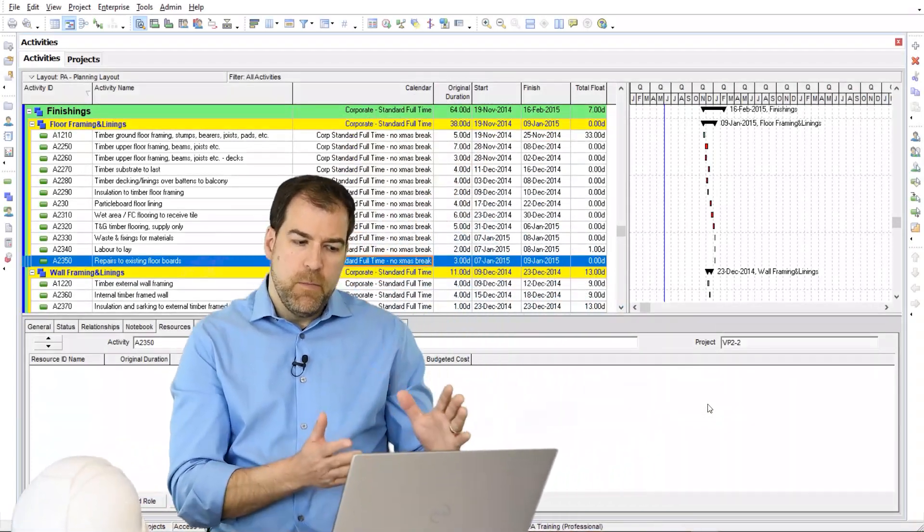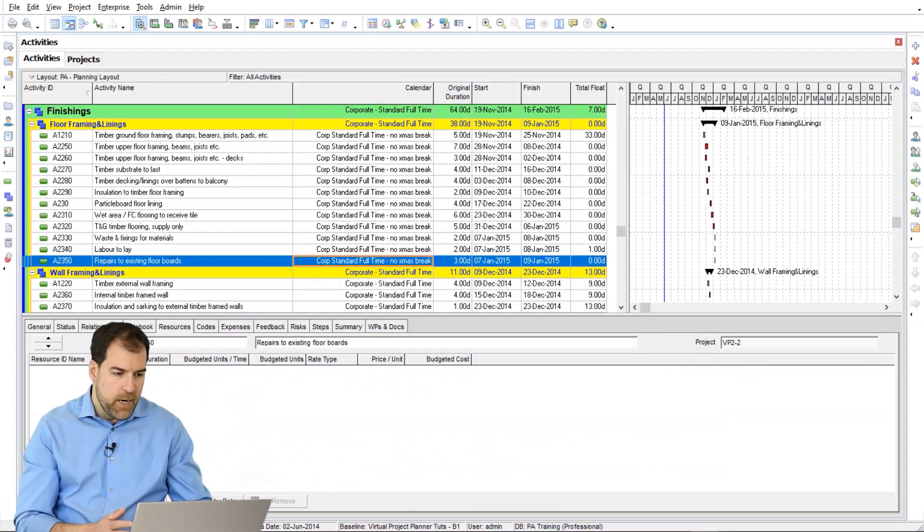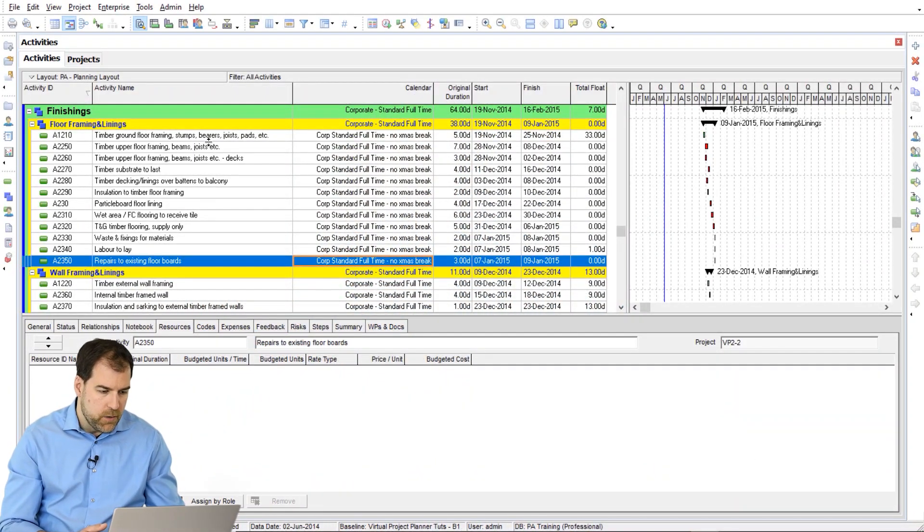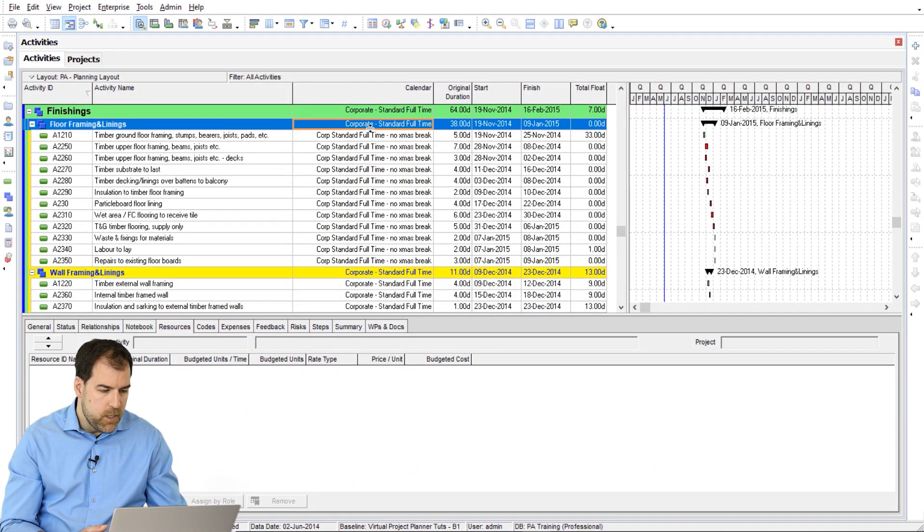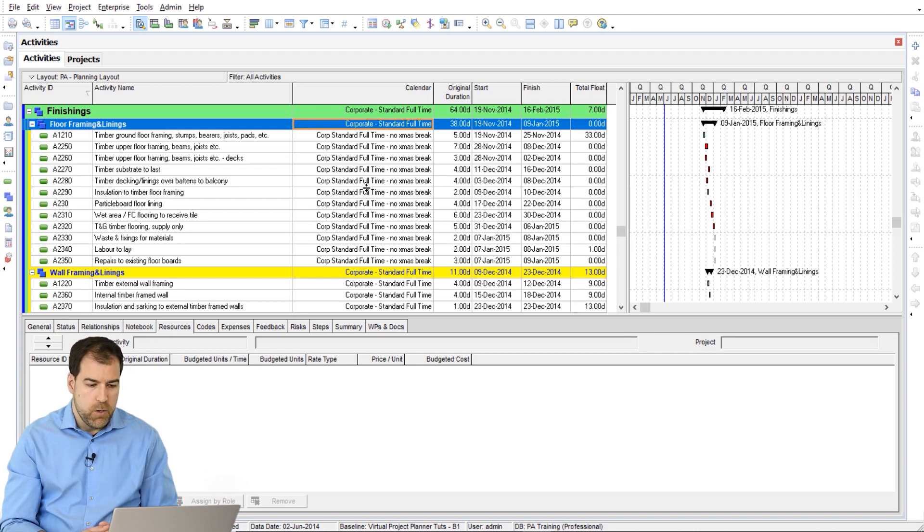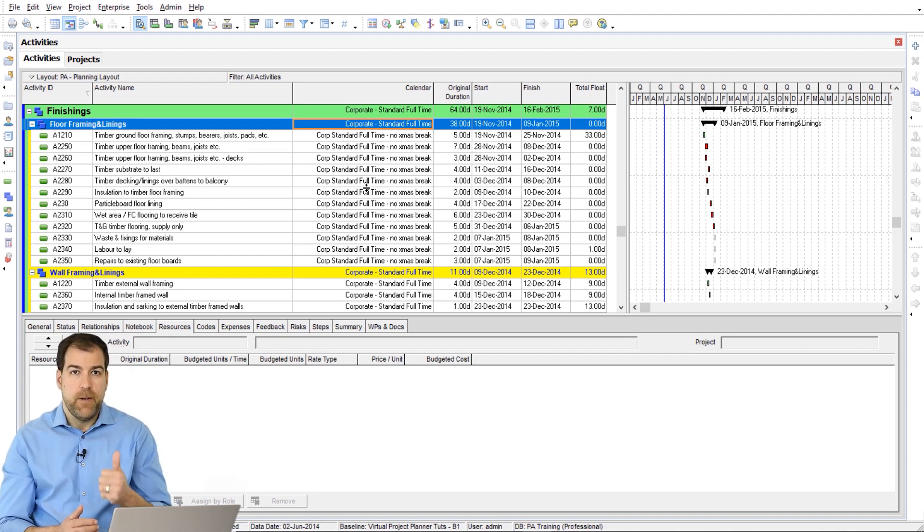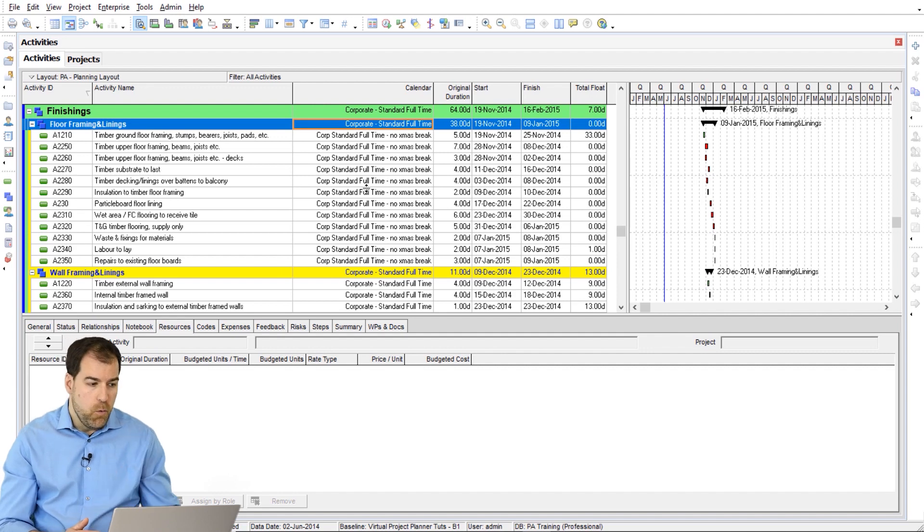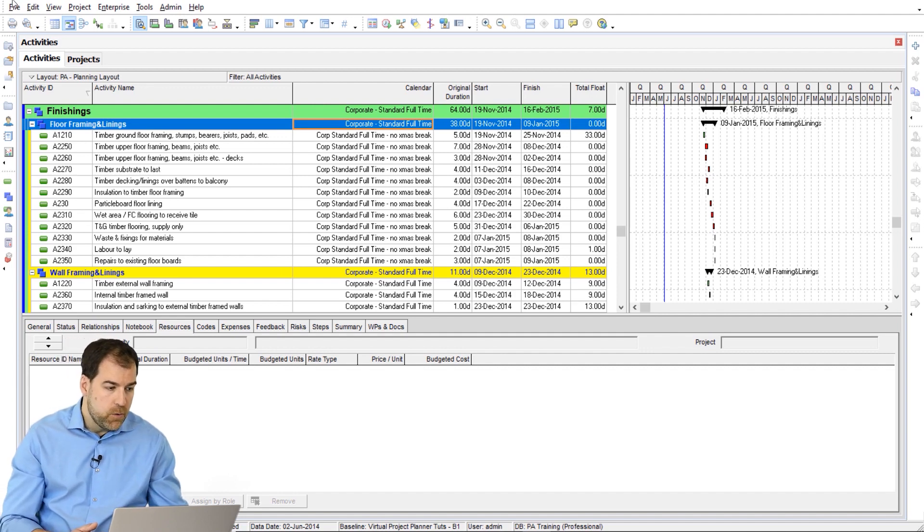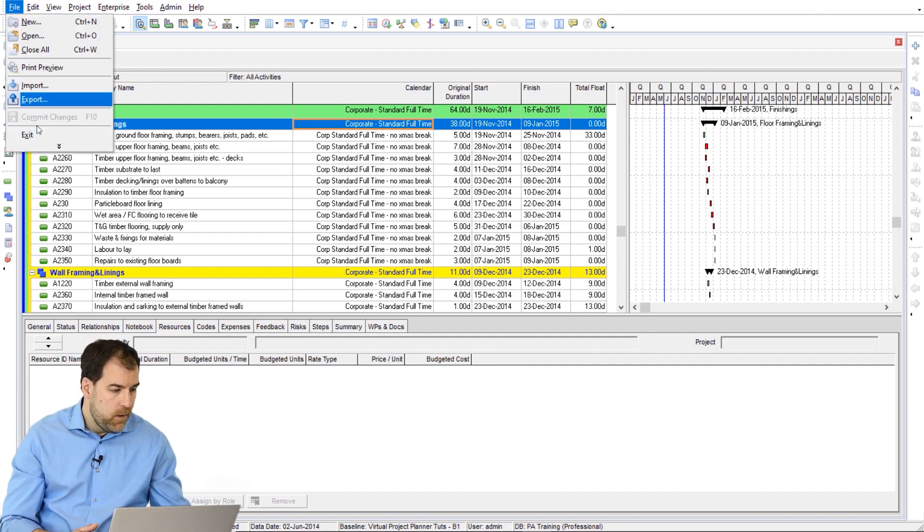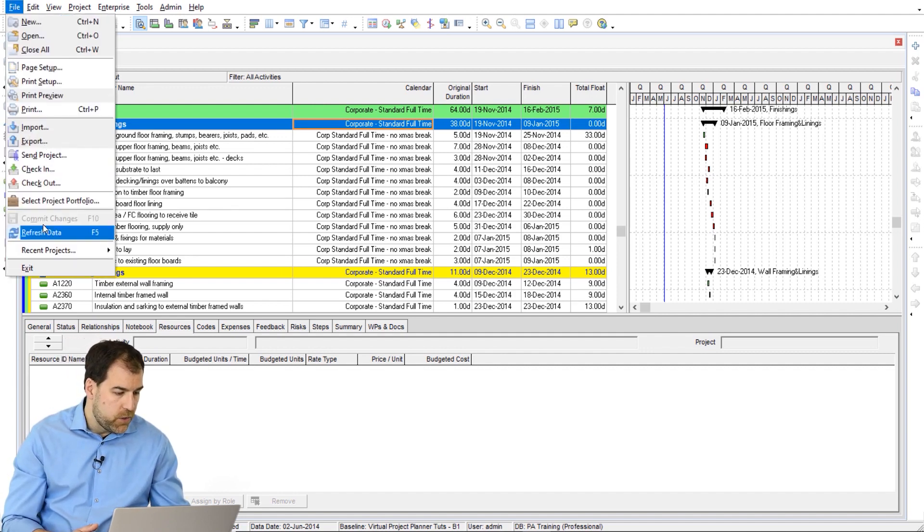So if you have a mismatch like I do right here, notice how the WBS calendar doesn't match the activities below. What can I do? Number one, try this. Hit F5 or go to File and do a Refresh.